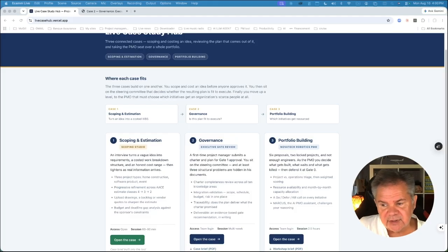So in this one, for example, you would be having a discussion with stakeholders, and the answers provided by the stakeholders are triggering requirements, and these requirements are triggering deliverables, and these deliverables are triggering kind of a benchmarking of similar duration to do that deliverable, activity lists that you would need for that deliverable, and also trigger some already estimates in terms of budget to do it.